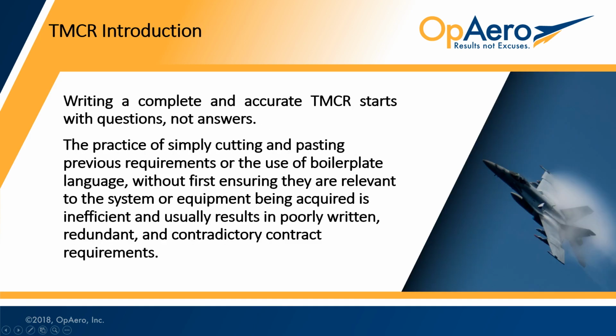Writing a complete and accurate TMCR starts with questions, like I just said, not answers. The practice of simply cutting and pasting previous requirements, or the use of what they call boilerplate language, without first ensuring they are relevant to the system or equipment being acquired is inefficient and usually results in poorly written, redundant, and contradictory contract requirements.